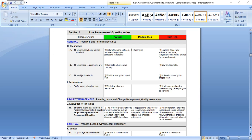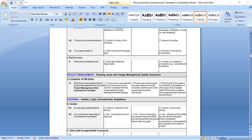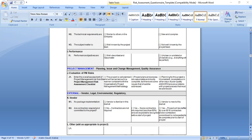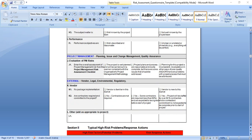Regarding the technology, technology being utilized consists of mature existing software, hardware, language, and database, this is low risk. Emerging technology, medium risk. Leading edge, new software that nobody has training for, new hardware, new language, new database or tools, this needs more training, needs more time, and will generate high risk if you get a subcontractor to do something. Talk about performance objectives: described and reasonable, or unclear and unrealistic, this will generate high risk.